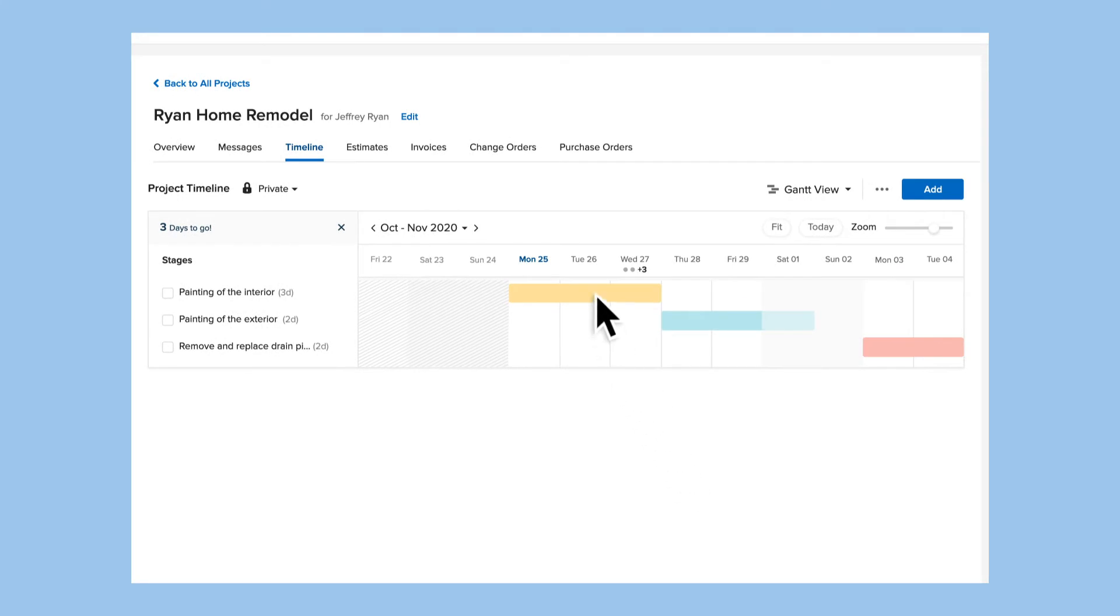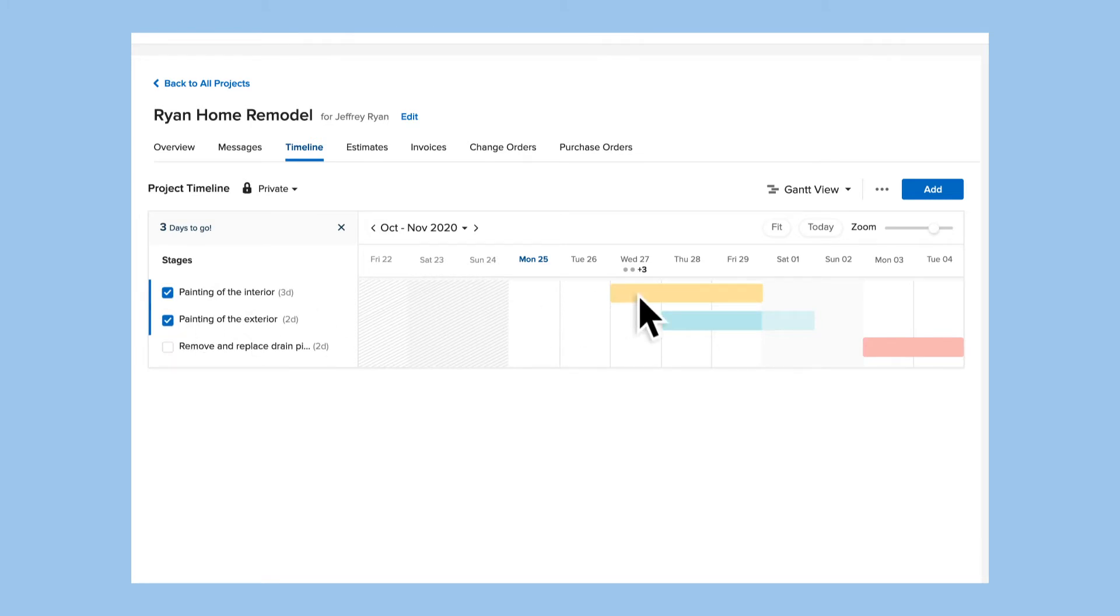If the timeline changes, you can easily drag a stage to the new dates. If your stages are interdependent, just select them and then drag to move them together with ease.